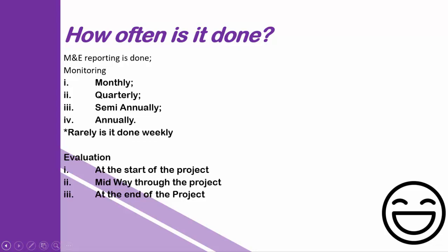That's how you determine how often you can do these monitorings. So it's dependent on the resources, and it's dependent on the activity itself. Like I said, trainings could be done on a monthly basis, but sometimes trainings could be done only twice a year, and that's when you can only do the monitoring twice a year.